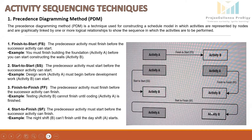The last relationship is Start to Finish, SF. This type of relationship is rarely used. The predecessor activity must start before the successor activity can finish. For example, the night shift B cannot finish until the day shift A starts. This relationship is a bit confusing — it flips the usual flow we see in other relationships. Activity A is still considered the predecessor even though it starts after activity B.